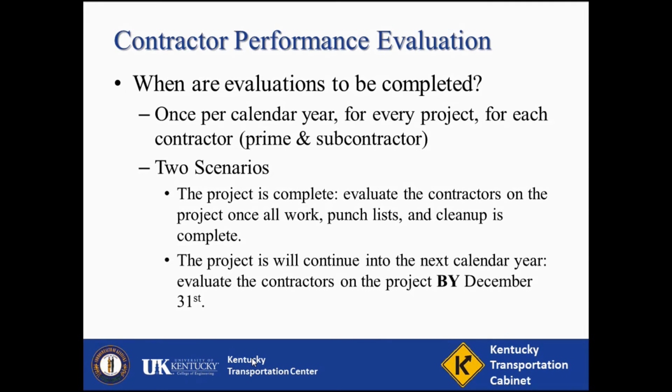Next, if a project spans multiple calendar years, complete an evaluation of those projects each year by December 31st. This may entail relatively close evaluations if a project is completed early in the next calendar year.